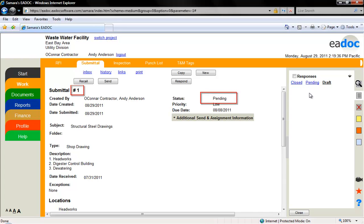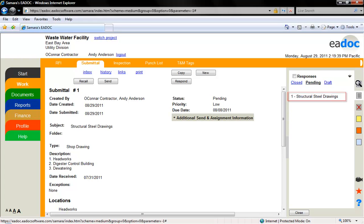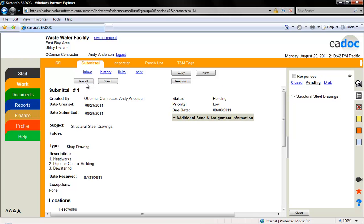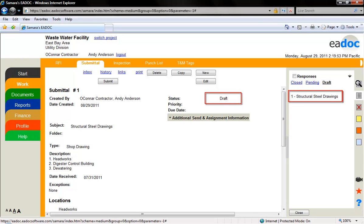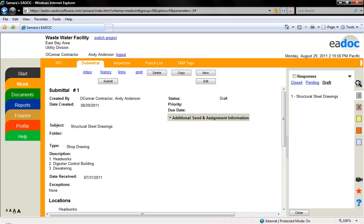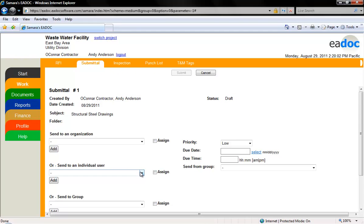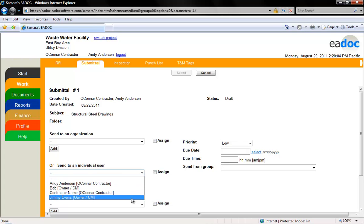Notice how the document has been assigned a number by eDoc and is under pending in the browse box. If you realize you need to edit a submittal, you can click the recall button to return it to draft status. If the recipient thinks that you need to edit the submittal, they can return it to you with a note detailing why they have returned it. The assigned number will stay with the submittal and cannot be adjusted.